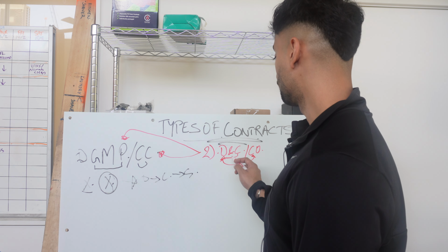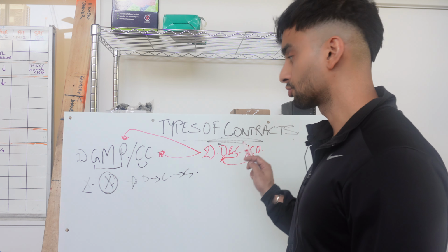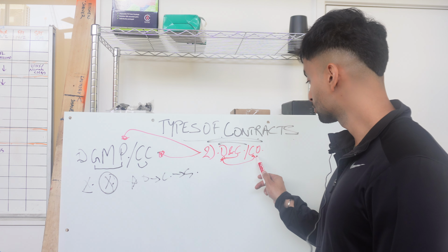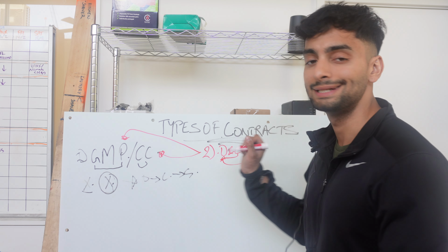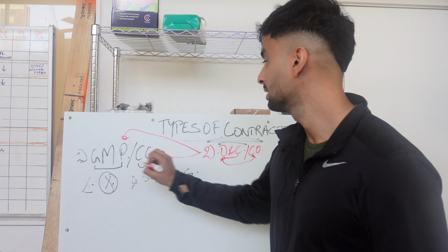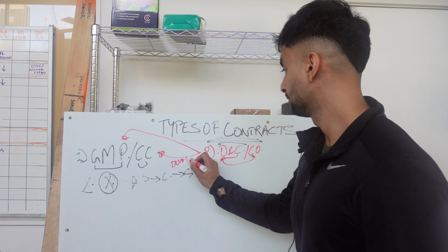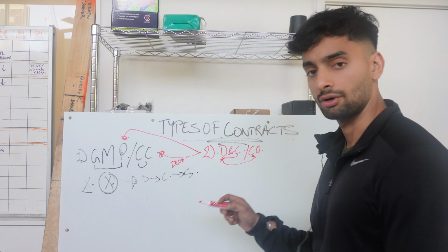and also be doing it design and construct, which means the contractor takes the obligation of design and construction works. The construction only, which is CO, means that the design documents are going to be provided by the developer to the contractor, so they can go ahead and finish those works.